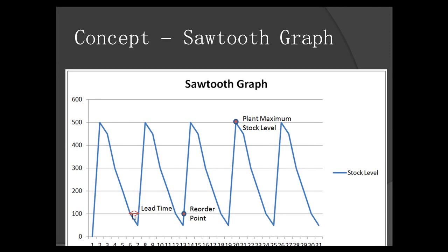And you would need a time to convert it into a purchase order and send it to the vendor. The vendor will separate the material, the goods, and send them to you. We call it lead time, which means the time from the purchase requisition creation until the goods are received. So here our lead time is very short.